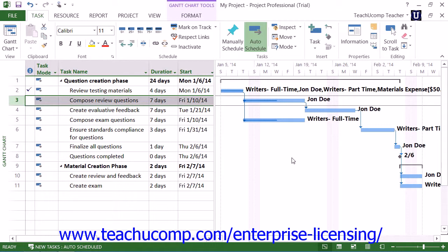For example, if your project file contained a front-loaded task with a duration of 5 days, you may complete 60% of the work on day 1, with the next 4 days completing the additional 10% of the work required. In this case, you can individually mark the amount of actual work completed on the task as it occurs to accurately record the amount of work performed. Entering a percentage complete for this type of task may not accurately reflect the actual work performed and could possibly cause Microsoft Project to create scheduling errors when calculating the remainder of the task's duration.